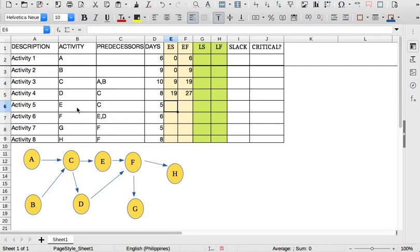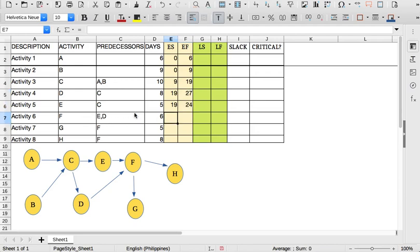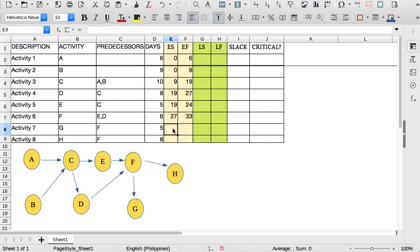E is also dependent on C, so the early start of E is also 19, and the early finish is 19 plus 5, which is 24. Now we go to F — the predecessors of F are E and D, so we select the maximum early finish of E and D, which is 27 and 24, so that is 27. Now we go to G. G is dependent upon the completion of F, so that's 33, and 33 plus 5 is 38.